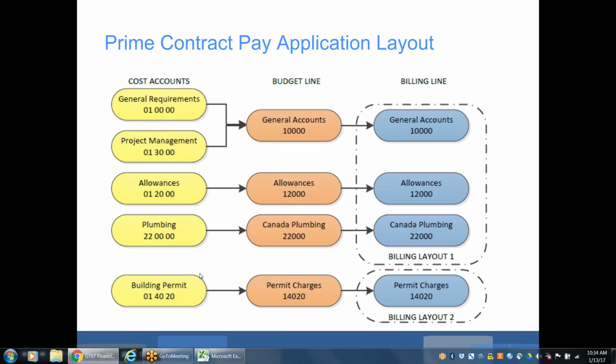And then once they are saved, the next prerequisite is really for the project manager to start breaking down the budget, working off of that import CSV and breaking down your budget lines, figuring out how you want to group them if you're going to be using one or two tiers, and then importing your budget line, linking the budget line. You can link it to one or you can link it to two.